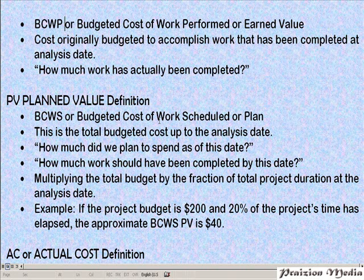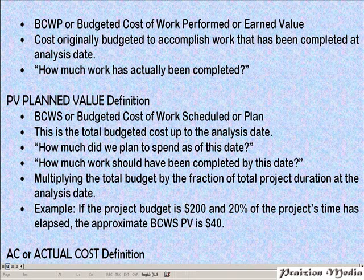Planned Value is calculated by multiplying the total budget by the fraction of the total project duration at the analysis date. For example, if the project budget is $200, and 20% of the project's time has elapsed, the approximate budgeted cost of work scheduled will be 200 times 20%, which gives you $40.